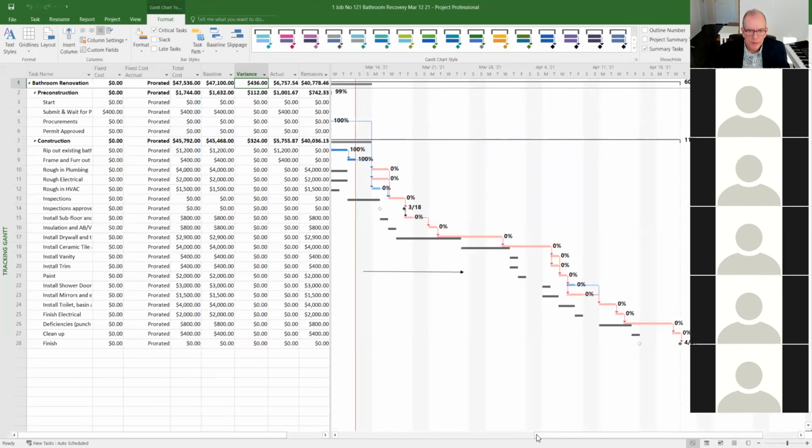So the direct method is detect. What's the D? What are we doing with the D, with the detect? What are we trying to do, Braden, with the D of detect in the direct method? Not sure. We're looking along the critical path. So we're going to detect along the critical path opportunities to save time.